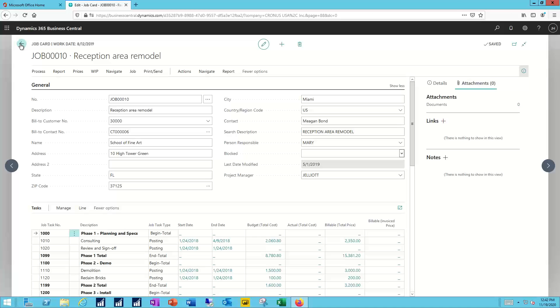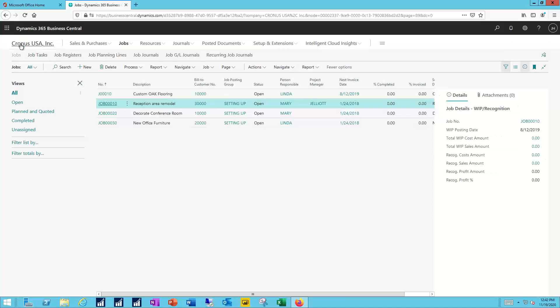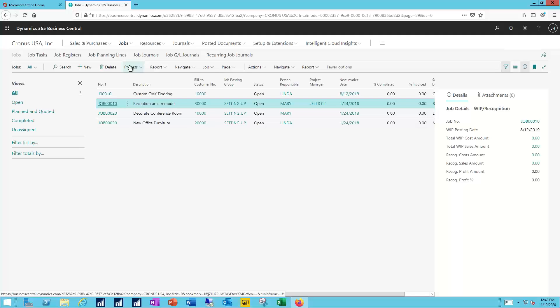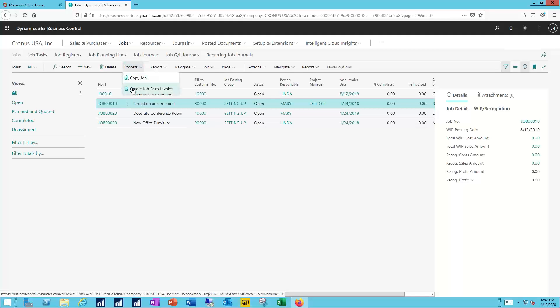If I return back to the list of jobs, I'm now ready to create invoices for all that calculated WIP and all the up-to-date jobs. Do that at the process level where I can simply go through and create a sales invoice for either a single or a whole list of jobs at one time.